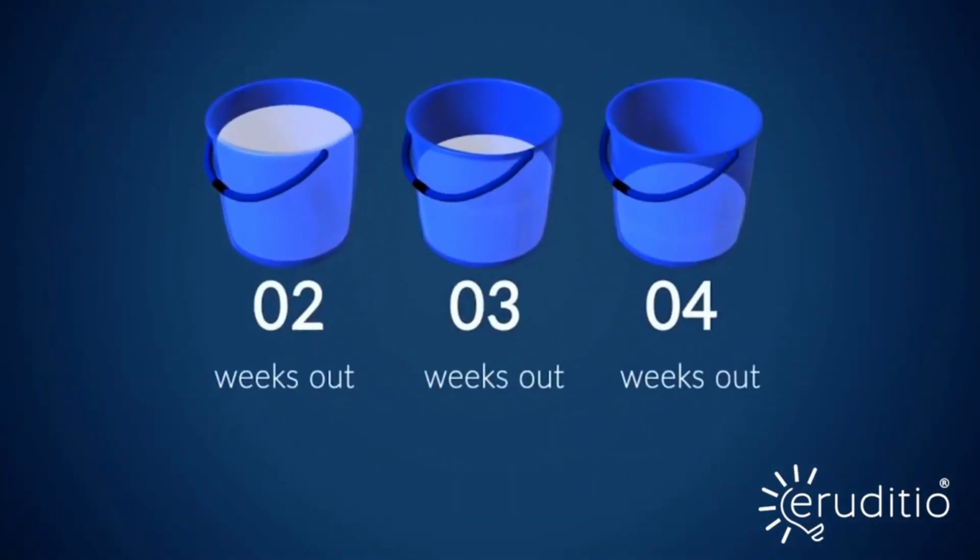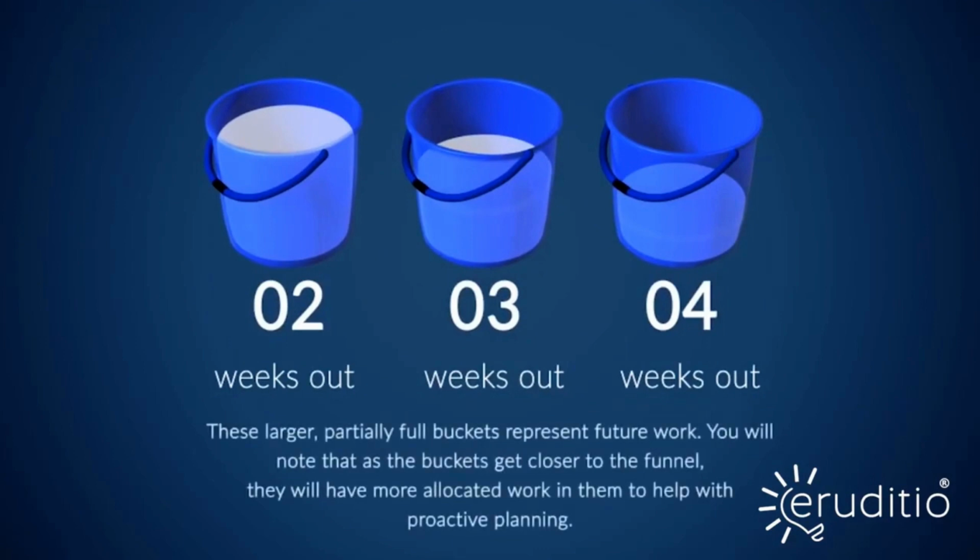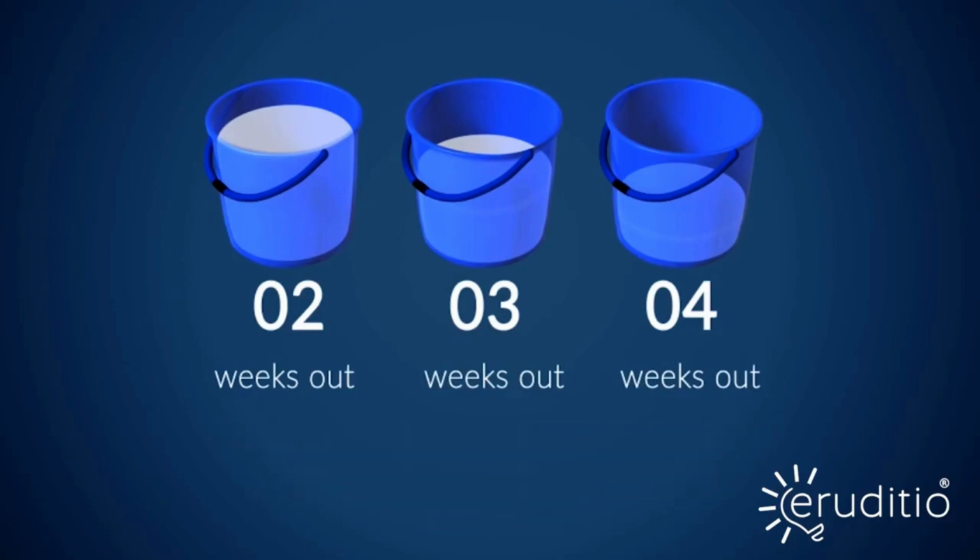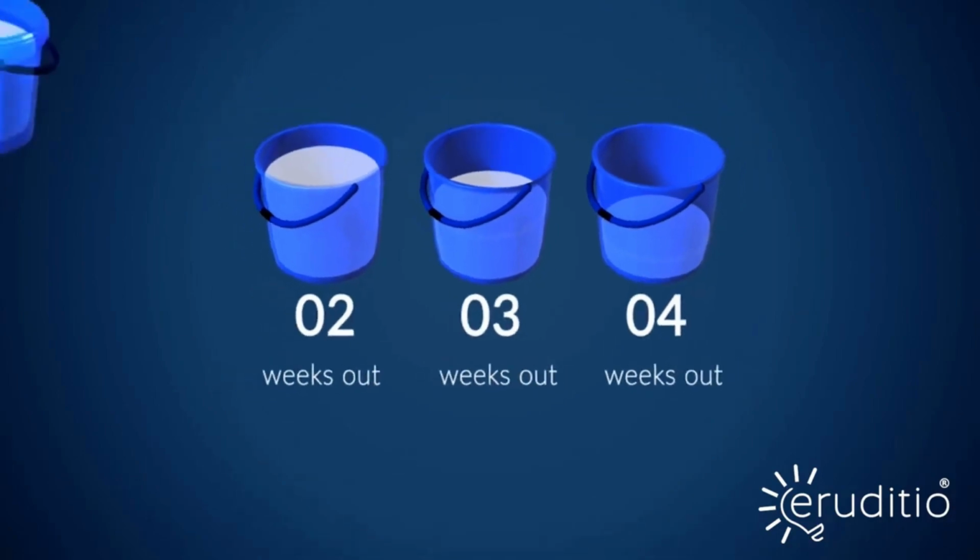Future schedule buckets. Based on the scheduling commitment as determined by your CMMS, work orders will be placed in the appropriate bucket up to 4 weeks in the future. The remainder of work orders for the future schedules are determined during a scheduling meeting between the maintenance scheduler and the asset ownership. The future work buckets should be approximately 75% filled 2 weeks out, 50% filled 3 weeks out, and about 30% filled 4 weeks out, the 30% being made up of PM and PDM activities driven by the maintenance schedule.